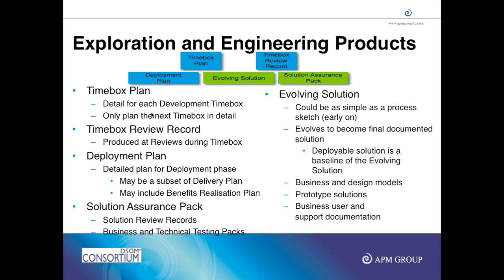And the products of these time box plan that tells the 10 days, 20 days schedule that we are going to have time box. Like the size of time box could range between 2 weeks to 6 weeks, but not more than 6 weeks. So we write the time box plan, and the time box plan is written by the team leader with the help of team members. Project manager does not create time box. Project manager defines how many time box, the length of time box, and the priorities. So with the help of visionary.